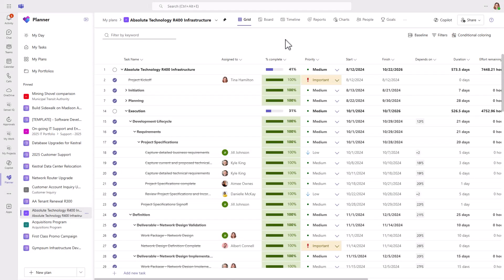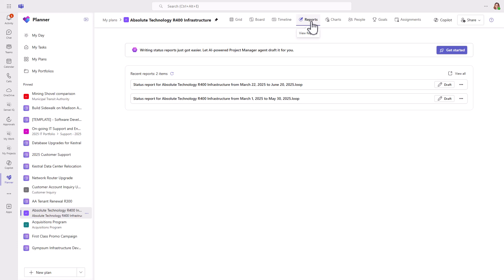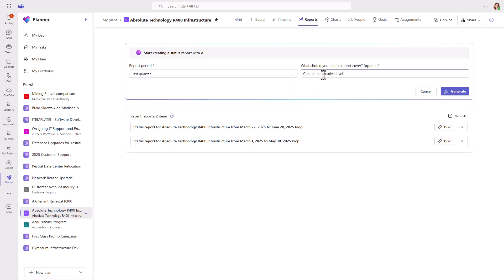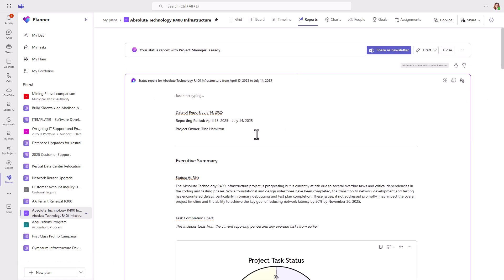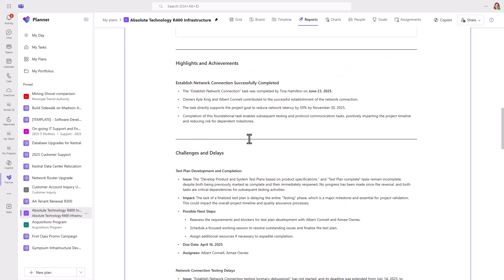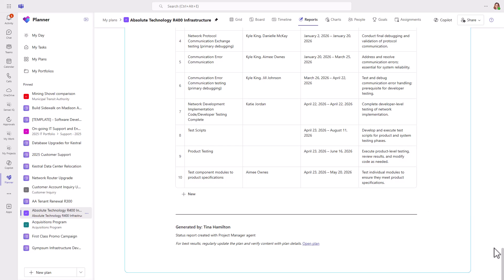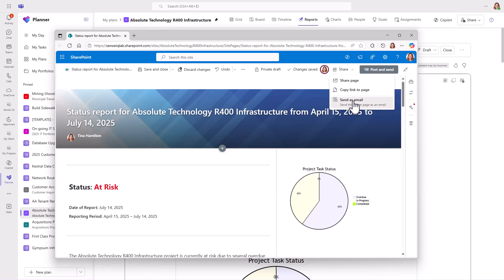Another recent addition is the status report with AI Project Manager. You must have at least 10 tasks in a shared plan with some progress in order to get the best results. Start by selecting a report period and then optionally enter a specific goal for your report. The project manager agent analyzes the plan and produces a status report for the selected time frame. You can edit the report and also share it as a newsletter or send it out via email.